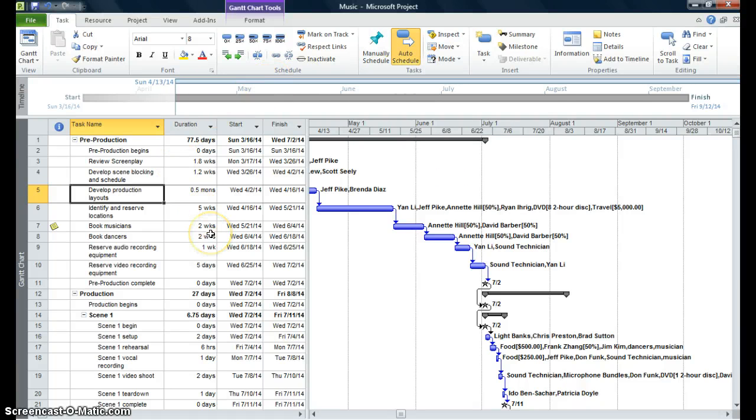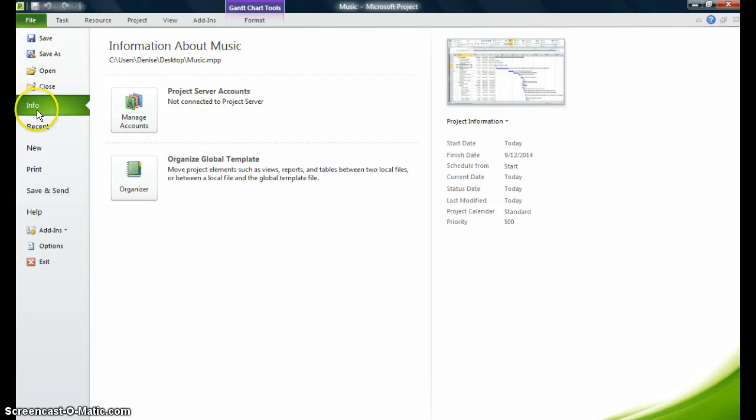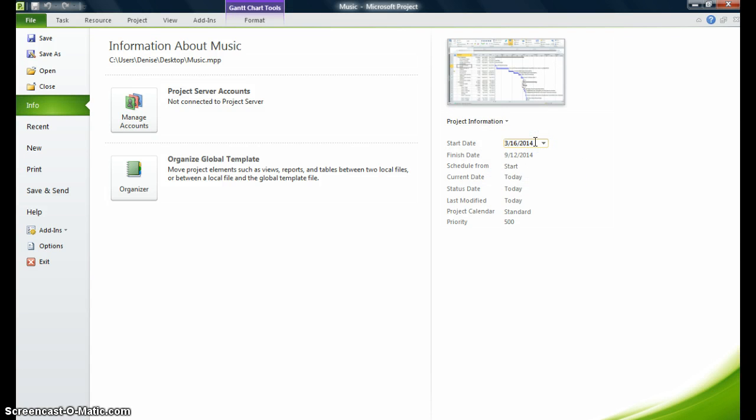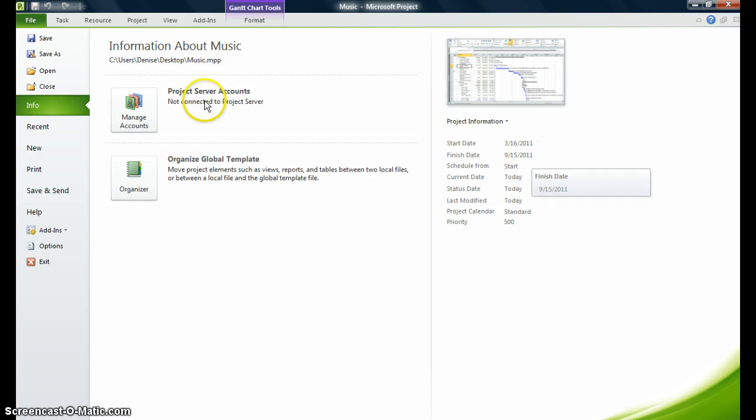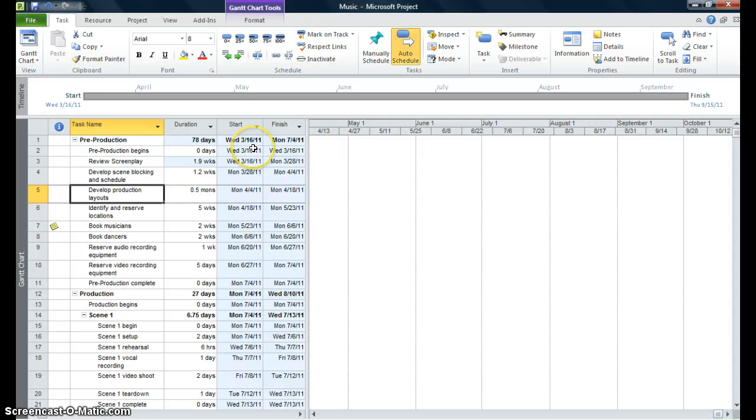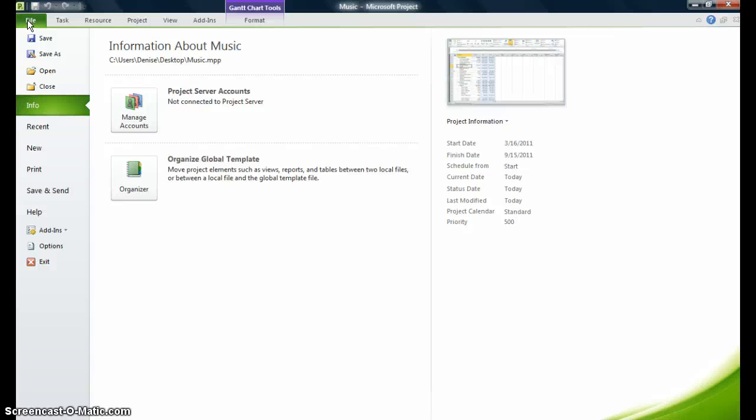Now let's just look at our backstage view. So we're going to click on file. That takes us to our backstage view. You can save, you can save as, you can open, you can close. And this info command is very important. You can see, if you look under the project information, you can have a start date of your project. So if I wanted to change the start date of my project to 3-16-2011, I would just type in the date, click out into the white area, and my project is now changed. I can go back to the task tab and you can see it's changed from 3-16-14 into 3-16-11. I'm going to go back to my backstage view and talk about the backstage for a minute.